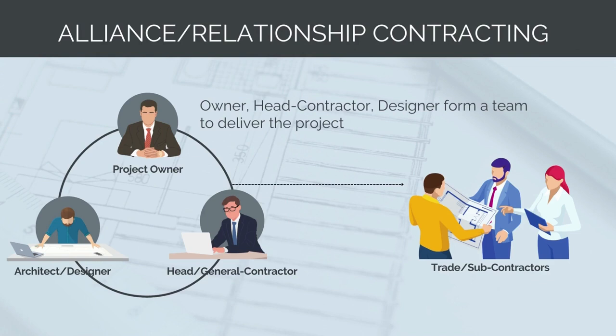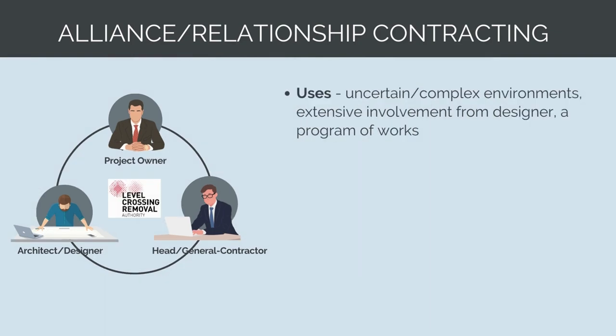The next model is alliance or relationship-based contracts. This is where the owner forms a team with the head contractor and designer to complete the design and deliver the project. It's a collaborative contracting model where they work together to come up with the project scope, budget and timeframes, and share in the profits or losses together. Similar to the managing contractor model, alliance contracts are used in uncertain and complex environments where extensive involvement from the contractor and designer is required. Alliances are also used where there is an extensive program of works — multiple ongoing projects to be delivered. For example, the level crossing removal program of works in Victoria, Australia are delivered using alliance contracts, as these are brownfield rail projects with significant uncertainty. The project team is formed during the feasibility stage and works through design, construction and completion stages.